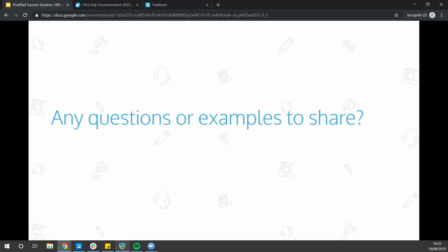Yeah, absolutely. And one thing, just obviously, I don't know how that user is using their roadmap, but just make sure that your roadmap cards are of the right granularity level as well. Those roadmap cards should really be a theme or initiative, which should be a headline of a problem or need to be solved. So they're more around the potential opportunities for improving problems for your product or a need around your product, and the cards should then represent how that meets your business objectives.